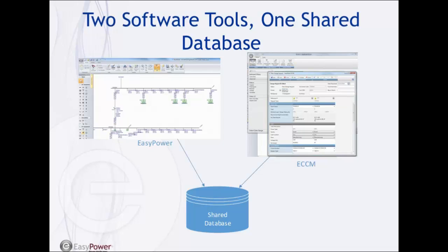Of course, the previous approach would require emailing the change request back and forth, applying those changes to the one line, and then verifying those one lines manually, sending out other emails, sharing files on a network drive that can be copied over and easily deleted or changed, without any documentation for any of that. So with ECCM, we have a complete log of any changes, any requests, any rejections and verifications of the change requests as well. So we have a complete history of any change requests that allows us to easily track and manage those.